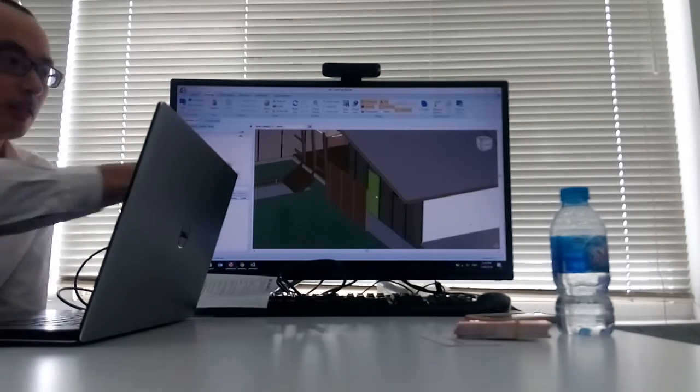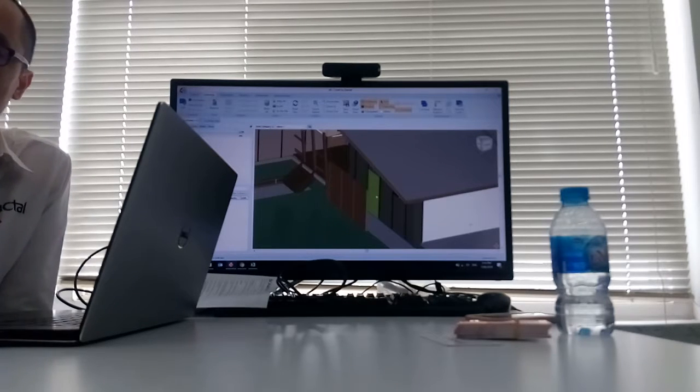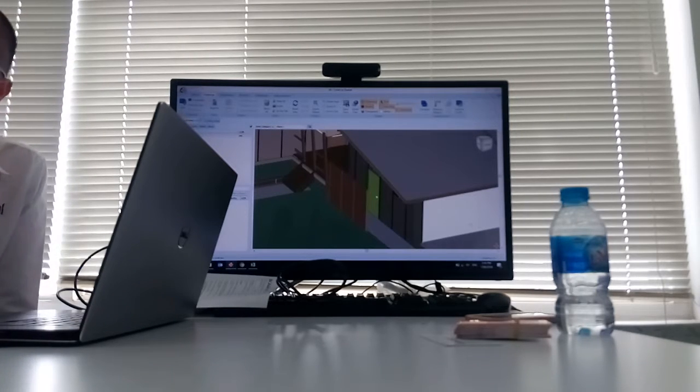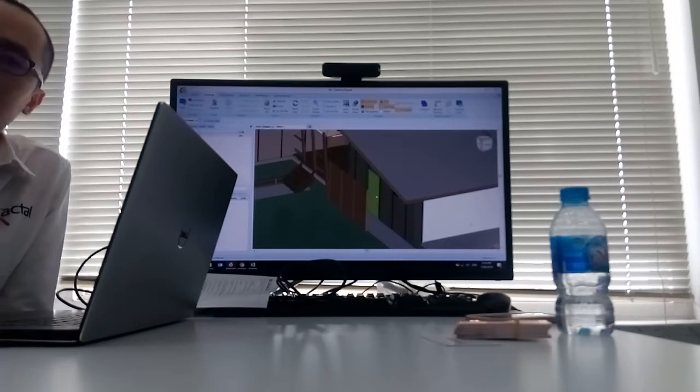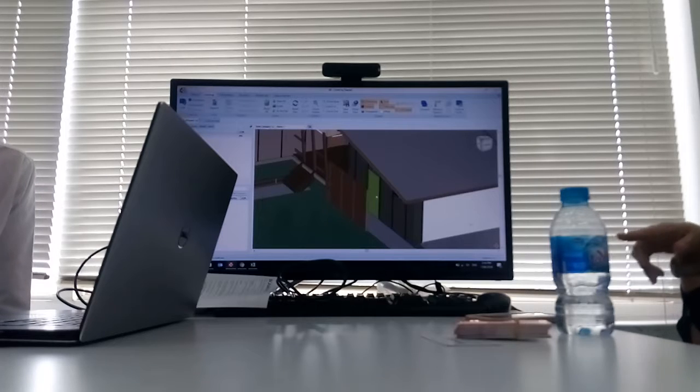Mhm. So just like this door, when you want to measure drawings for painting, you need to measure the hinges, doorknob, painting of wall, architrave, or there is a lintel on top. The lintel will never appear in the model, no matter how good. It's one of the reasons why every project is always over budget.